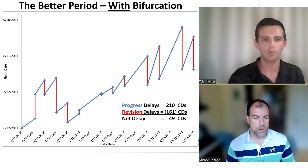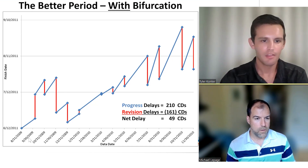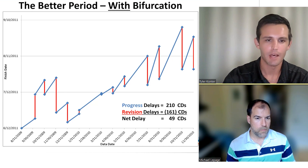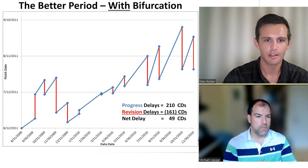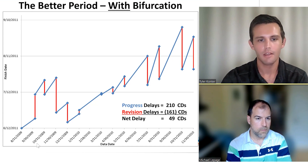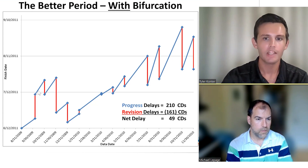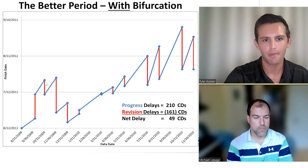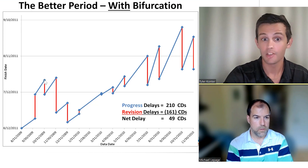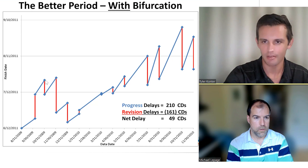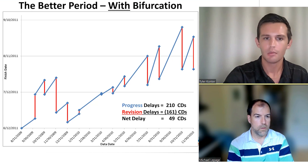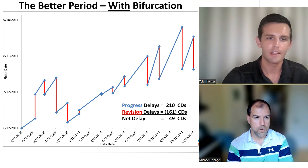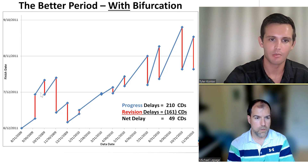That's absolutely correct. Let's take one of these periods as an example. This is our September 30th, 2009 update, represented by this blue dot here. If you look at our next update — October 31st, 2009 — we lose progress. That happened in this period; we get to this top dot here, which is the completion date when we just incorporate our progress delays. We then incorporate revisions into our schedule to bring that dot back down to where it was at the beginning of the period.